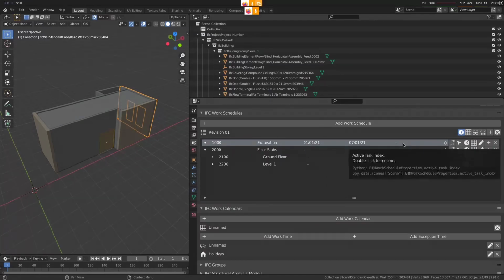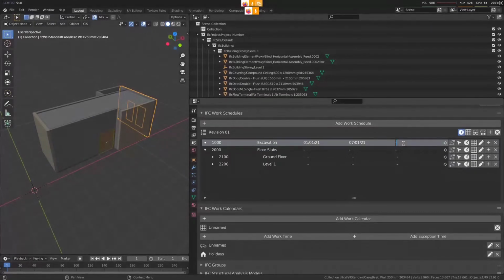Now, over here we have the duration, which is what you'll notice right now is that it doesn't typically calculate the region, and that's something we do need to do. But we have set it up so that if you type in the region, it will calculate the finish date or something like that. So it's still something we're working out. So if I change that to 3 days, duration follows the ISO 8601 standard. Right now you actually have to type it in that format, which is just something you'll have to learn.